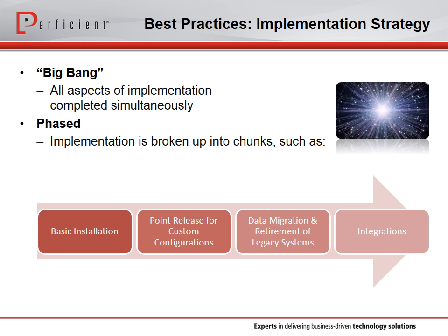Also, again, once they deployed the system and the users had time to use it for a few months, the users inevitably come up with additional requirements for enhancements that not only affect the base application functionality, but the need to potentially update interfaces as well in subsequent phases. So, we usually recommend that you plan for a phased implementation.